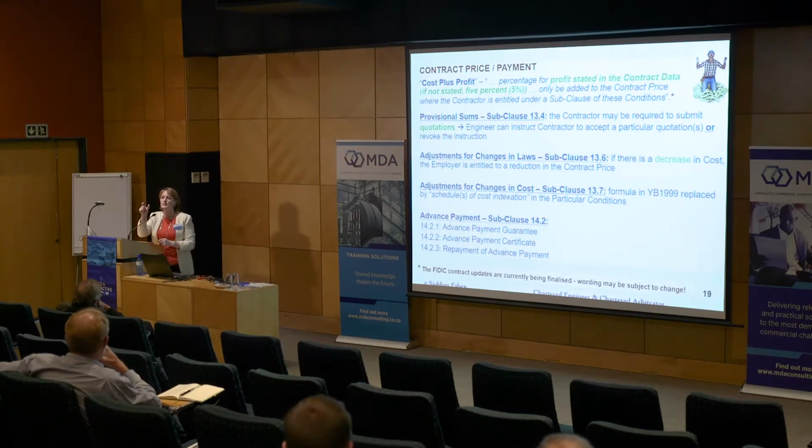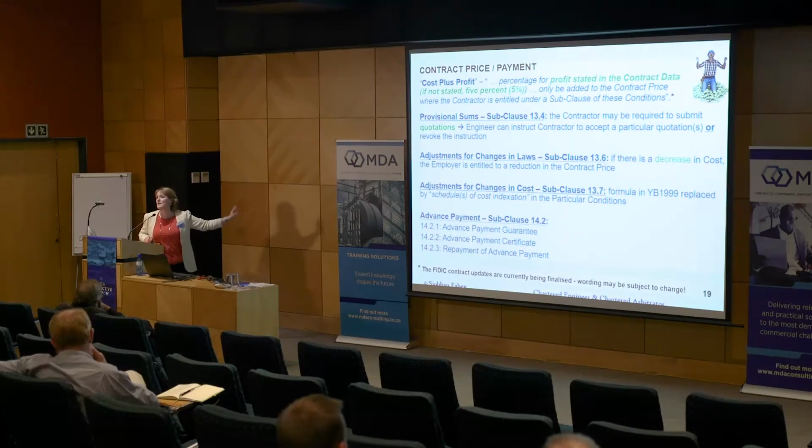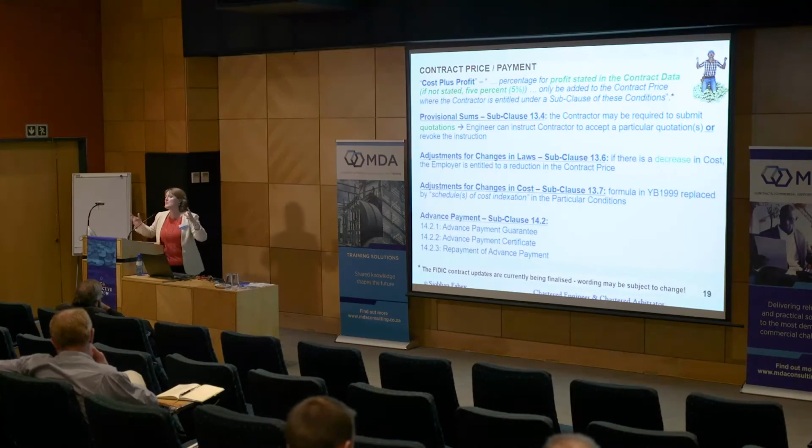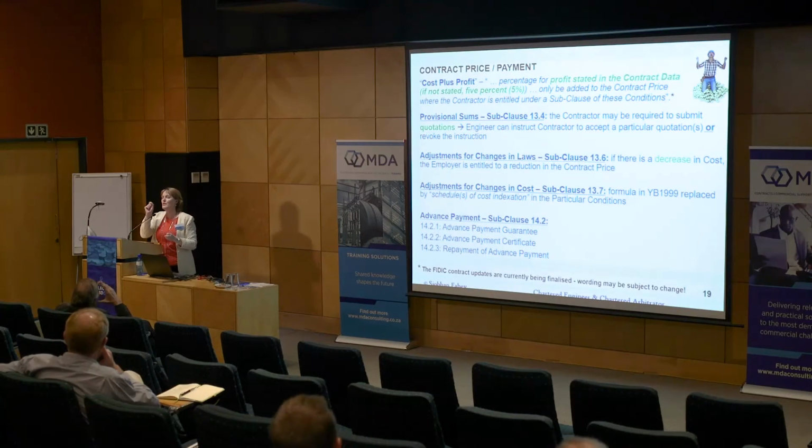You don't want to give the contractor too much money because he might take off with the money. And at the same time, you don't want to underpay him all of the time, which employers and engineers regrettably do too often, because then he might start withdrawing resources from your project to send to another project where he is making better money. So the best case scenario is to try and keep the contractor in just positive cash flow.